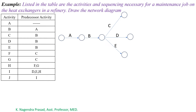Next, observe activities F and G. For these activities, the predecessor activity is C, which means after completion of activity C, F and G will start. So let's draw activities F and G after completion of C.